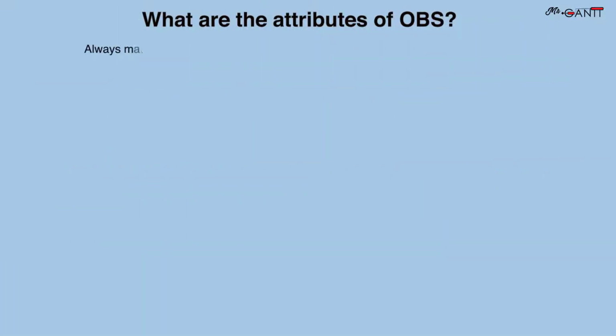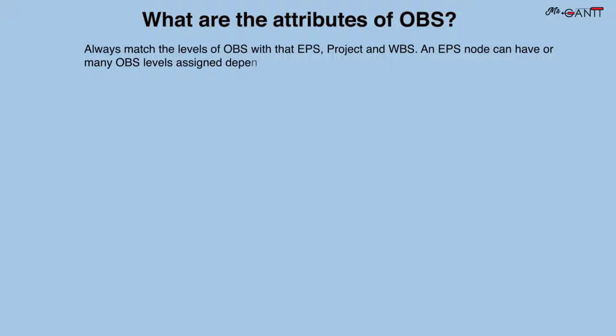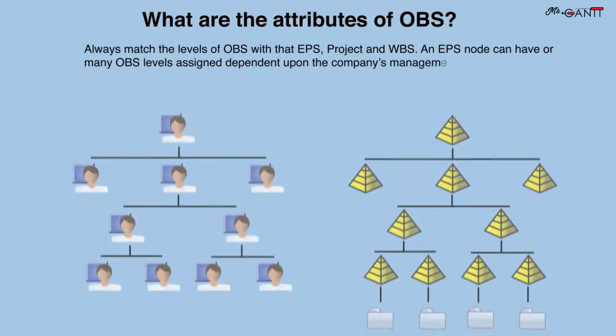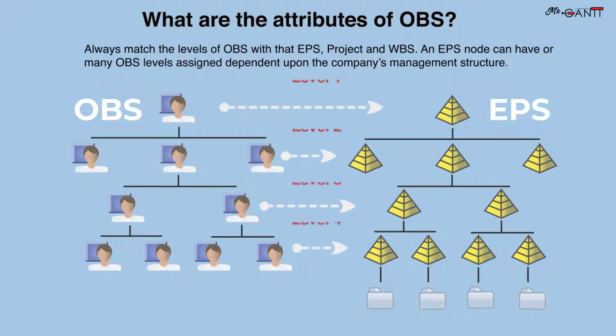Always match the levels of OBS in the EPS, project and WBS. An EPS node can have one or many OBS levels assigned, dependent upon the company's management structure.